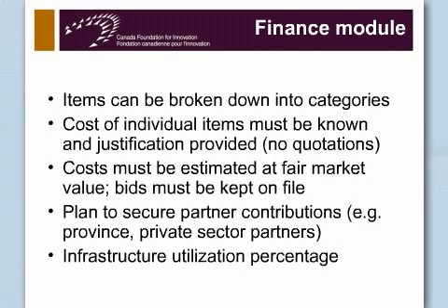Normally, for the contingency for construction, because construction costs are often difficult to assess at the time of the proposal, we ask you to allow for a 10% contingency in your construction costs.